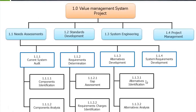Work packages are one method of decomposition, with examples like components analysis, requirements, identification, and alternative analysis — coming down from higher levels like need assessment and standards development. Each area such as project management, system engineering, and standards development has its own work packages.